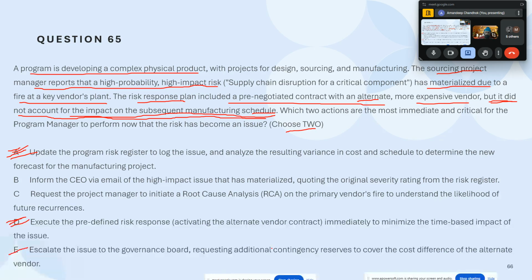In such cases, if we have to make a small order to them, assuming you are an established company, then you can pay them some expedited delivery charges, and they try to increase your priority to the top and meet your request, which they don't do for others who don't pay those expediting charges. Absolutely, I do understand that.